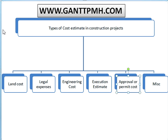In miscellaneous cost, we can have transportation cost, incentive costs, and other miscellaneous expenses — typically around 4 to 5% of the overall project cost. This is a brief overview of the types of cost estimates in construction projects. If you want to learn these topics in detail, there will be a separate lecture. Thank you.